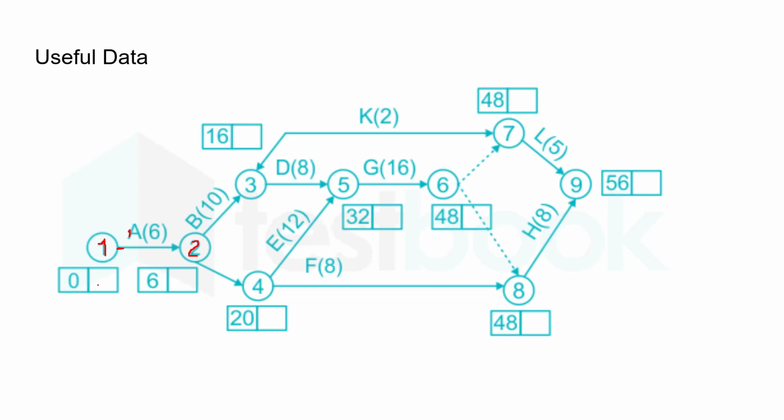So in order to find the longest path, you have to keep on adding the length of each path. So for this I am drawing a path, and for this path you calculate the days. So this path will give you how much? 6 plus 20, sorry, not 20, 14 here. See, 14 is not written here, so that will give you 20.